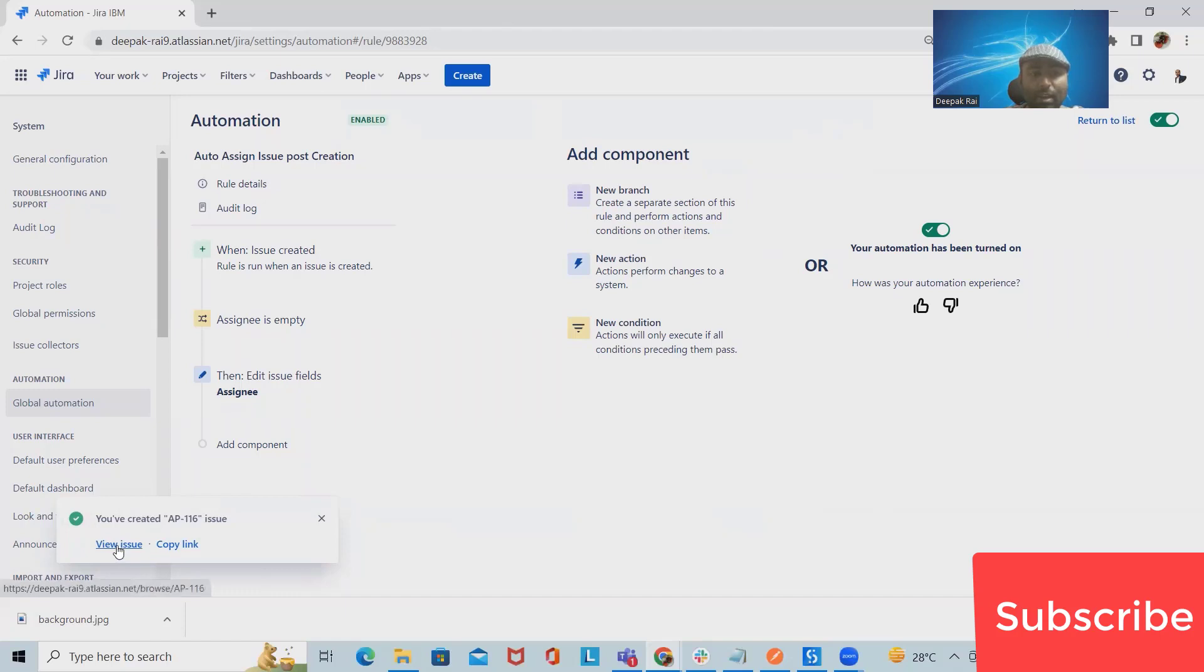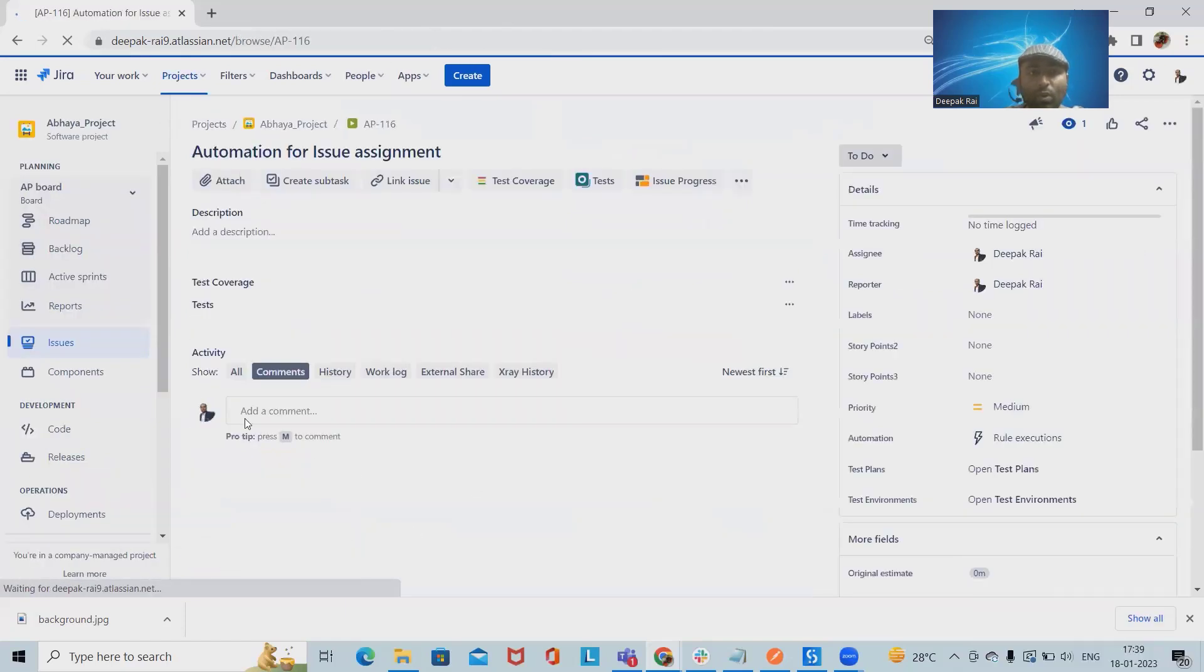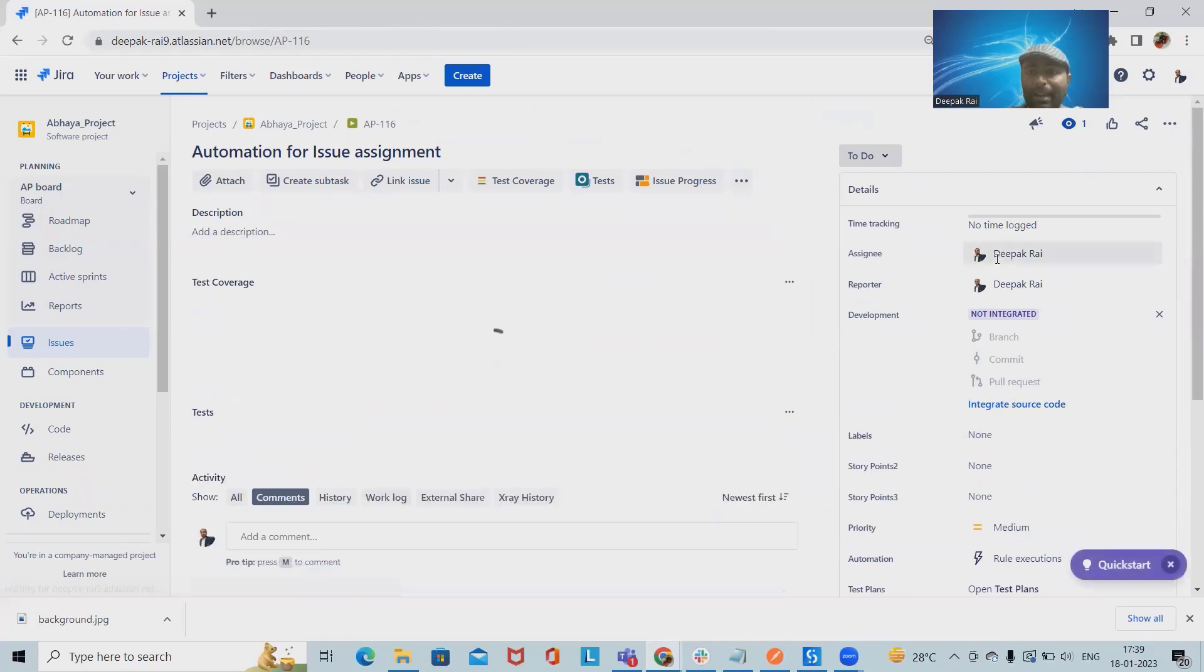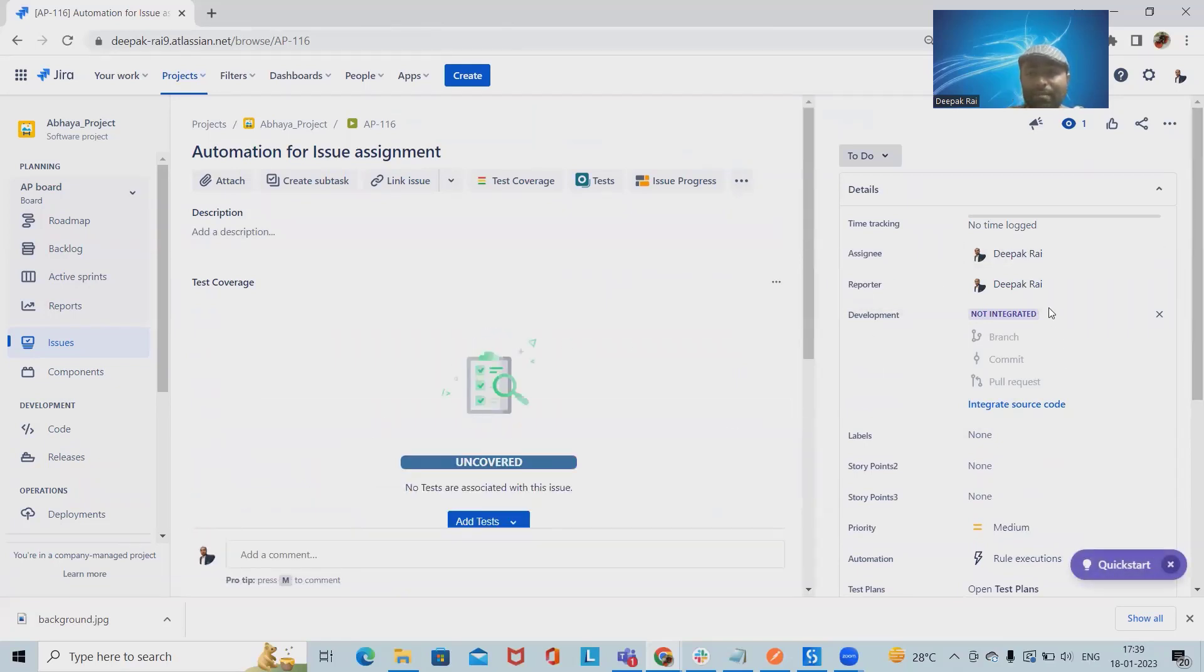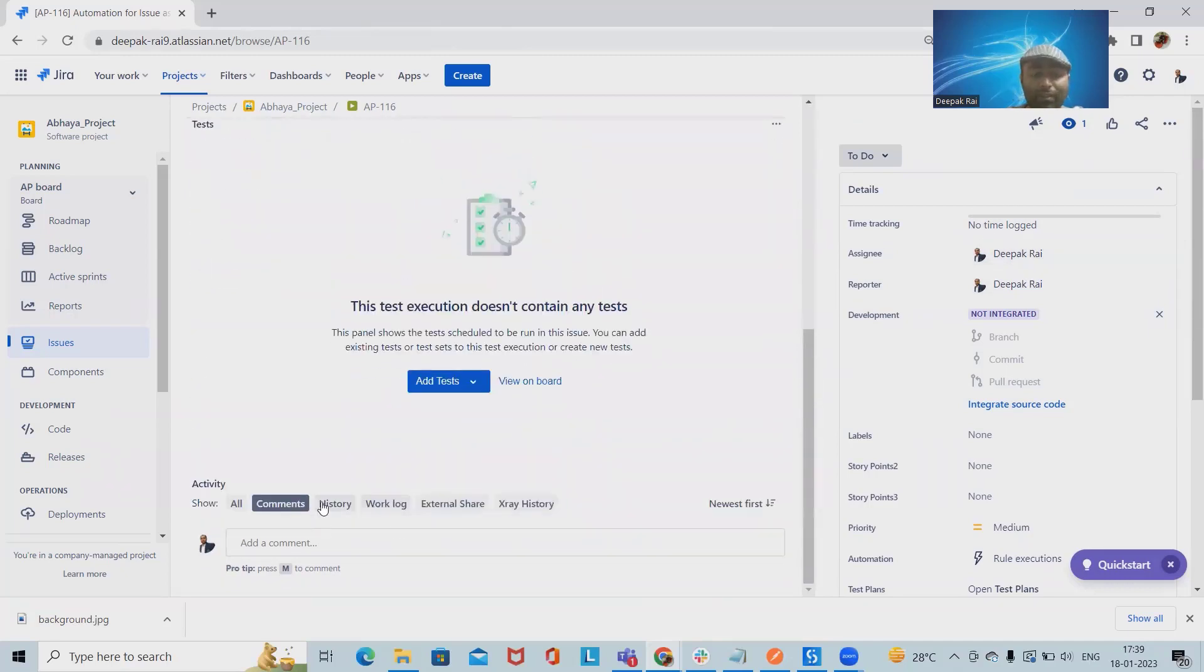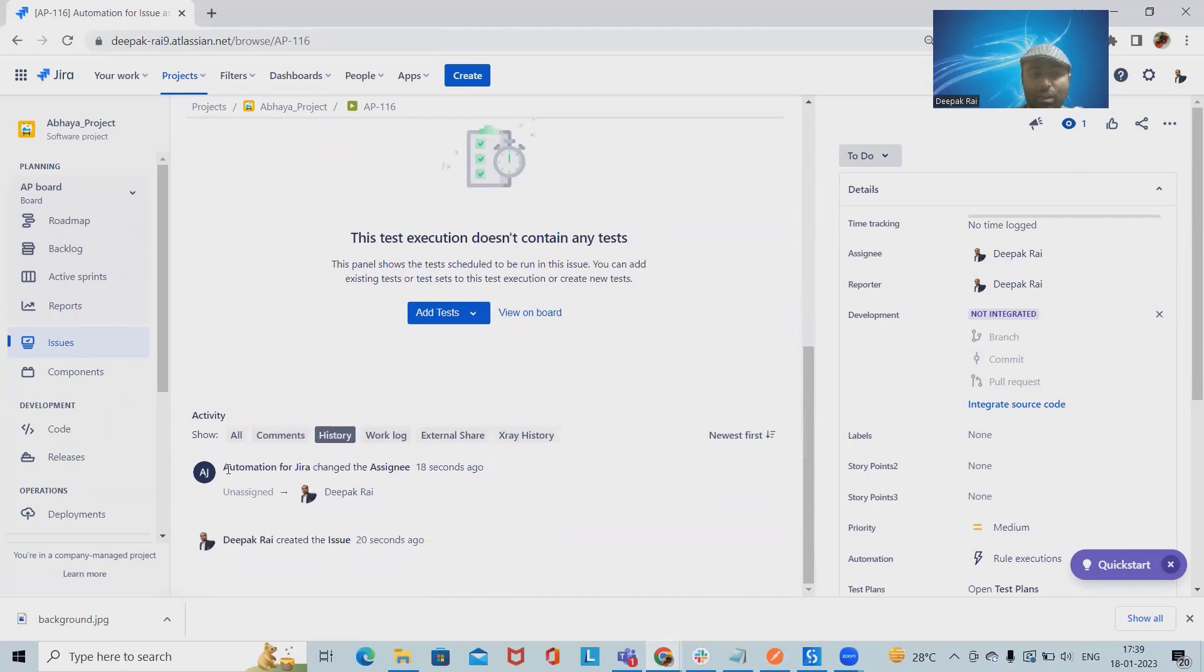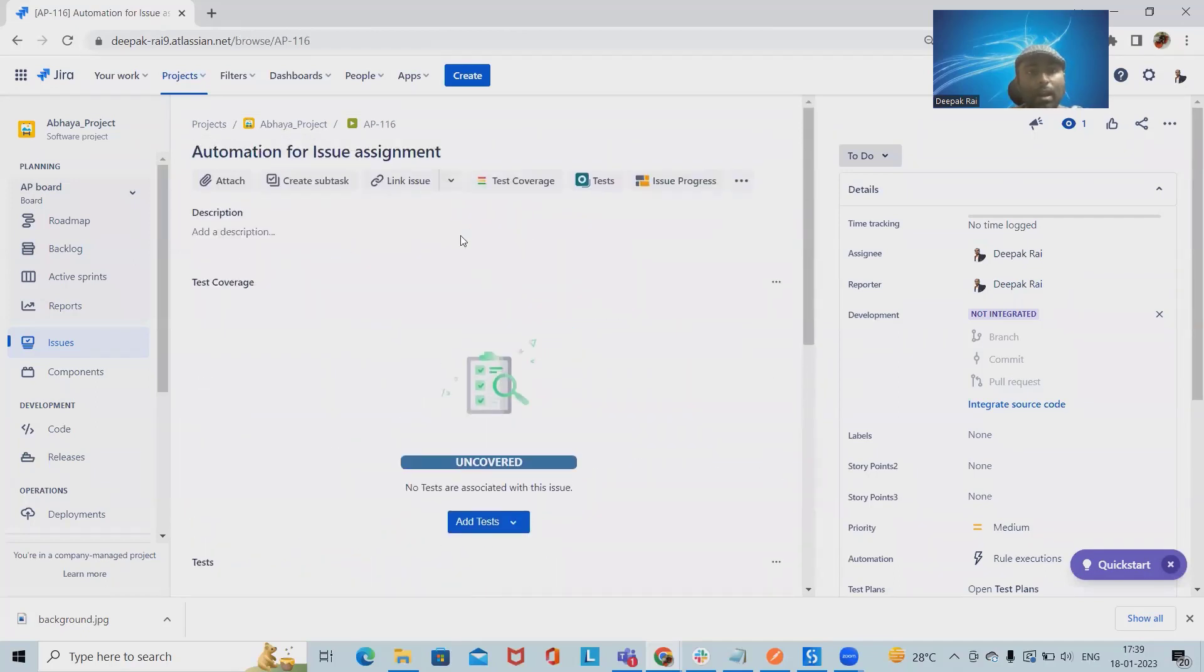been created. When I navigate into the issue view, you can see this issue is automatically assigned to me because it ran our automation rule. If we want to cross-verify it, we can also check inside the history where we can see Automation for Jira rule has been triggered. That's the reason it was automatically assigned.